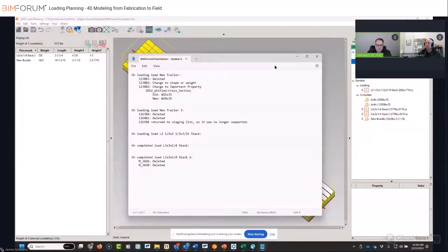So let's say on that floor, there was a handful of them that we wanted to add shop fabricated web openings in? Well, it depends. Everything always comes back to it depends. Meaning, where in the shop are those pieces? If they were on hold and they haven't even gone into production, remember how I was grabbing that information from that production area? They would have a marking as being on hold and I would hide them from me so that I wouldn't load them onto the trailer.